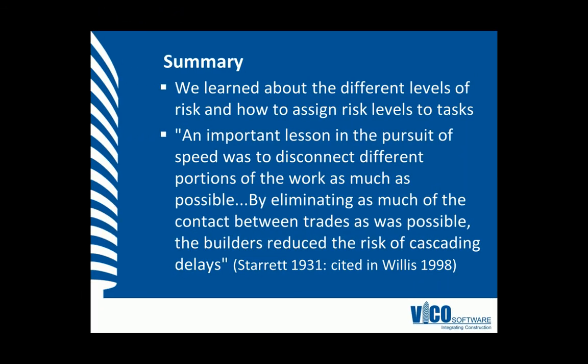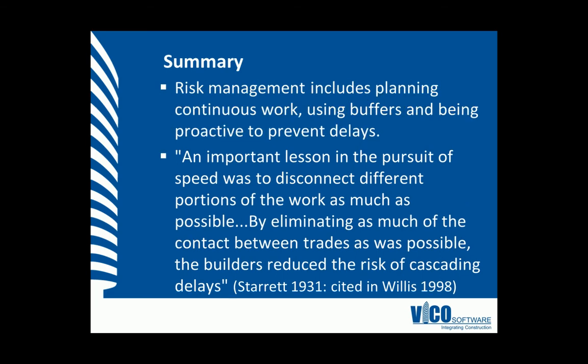In this vignette, we learned about the different levels of risk and how to assign risk levels to tasks. We can draw inspiration from the Sterrett brothers who built the Empire State Building in 1931. An important lesson in the pursuit of speed was to disconnect different portions of the work as much as possible. By eliminating as much contact between trades as was possible, the builders reduced the risk of cascading delays.